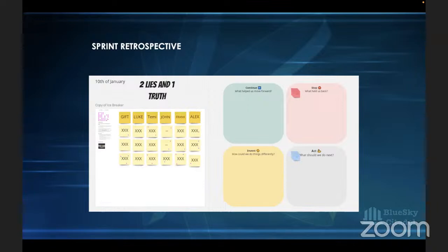So yeah, the highest vote will be actioned, and the improvement would be like the action plan or the improvement plan for the next sprint. So it will be the retrospective commitment for the next sprint. And so you make sure that this selected item remains visible to the team at all times. So this selected item that is in the act, you could just put it on the product backlog. Make it visible on the board. Let them see that this is what we have decided to do this sprint.